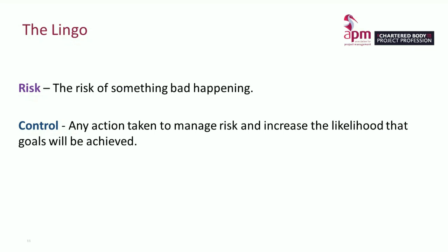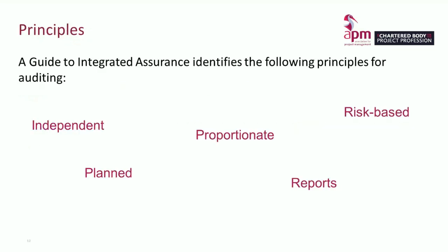In project management, controls are used to manage change risk. This could be a signed off document, such as the business case, where you ask stakeholders to agree to the objective, costs, risks, etc. associated with the project. Or it could be a decision-making forum or a risk register and the processes that sit around it. Hopefully that clarifies why we always talk about risk and control within audit.